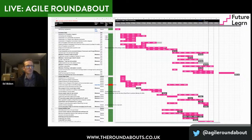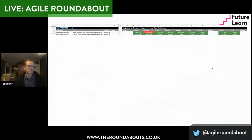As a result, the team split its work into five or six different work streams, which you can see here. That's why you get this big split of work, because they realized, wait a sec, we can go faster if we parallelize this work. We basically doubled the size of the team with engineers that we found from different teams, and we brought in some contractors. That suddenly meant that we could increase the speed of that team, remove it as a bottleneck, and we made the deadline in time.